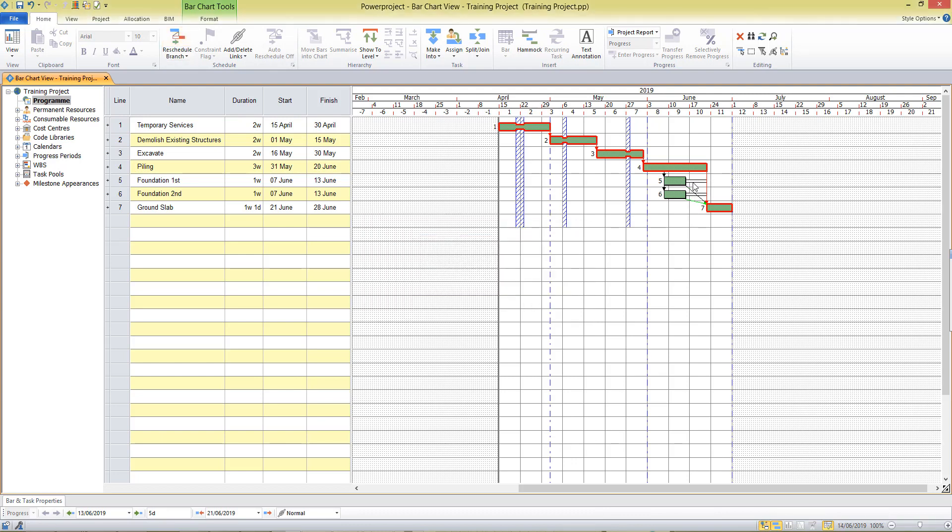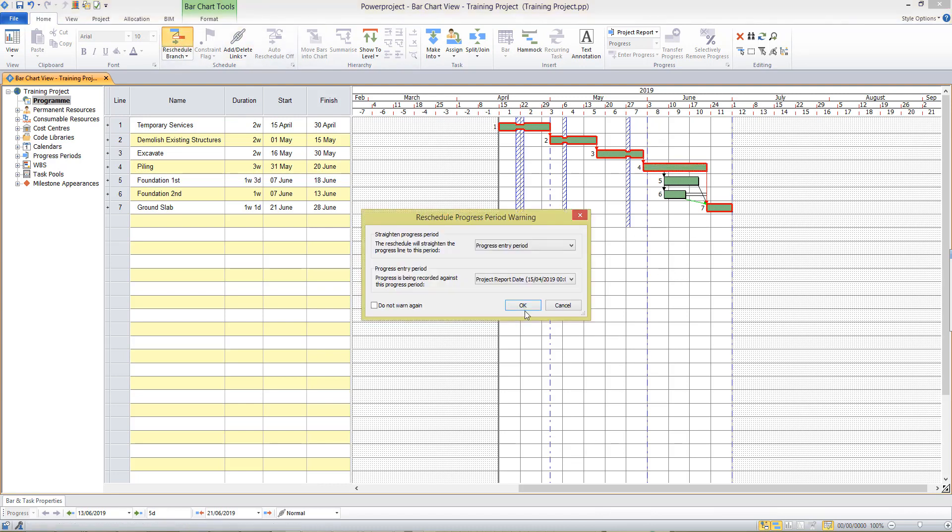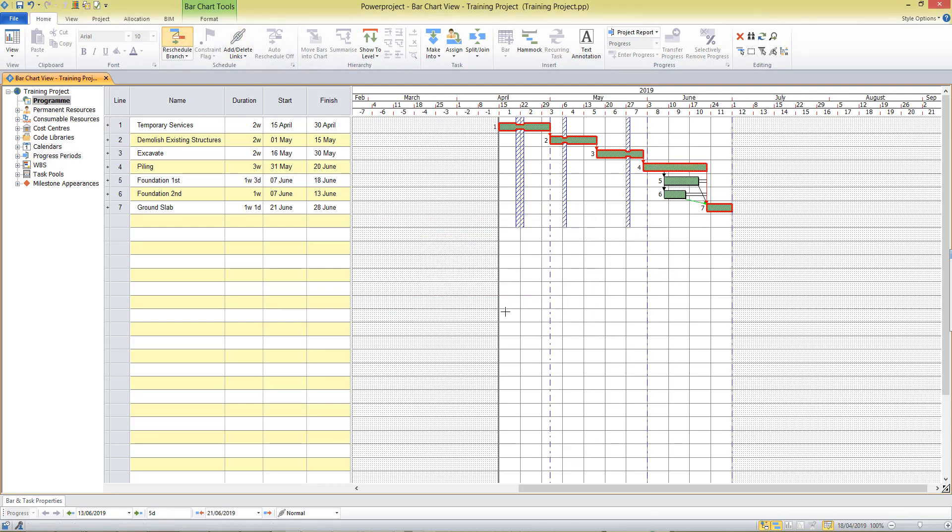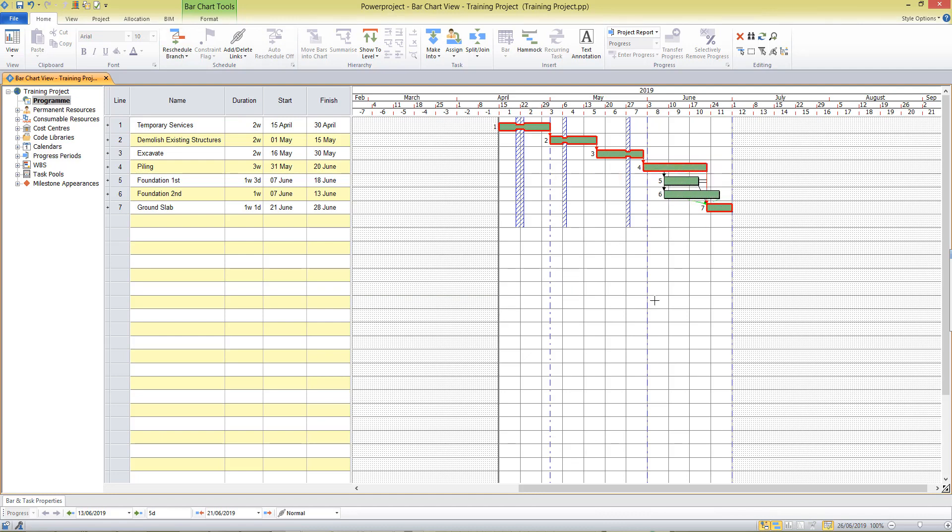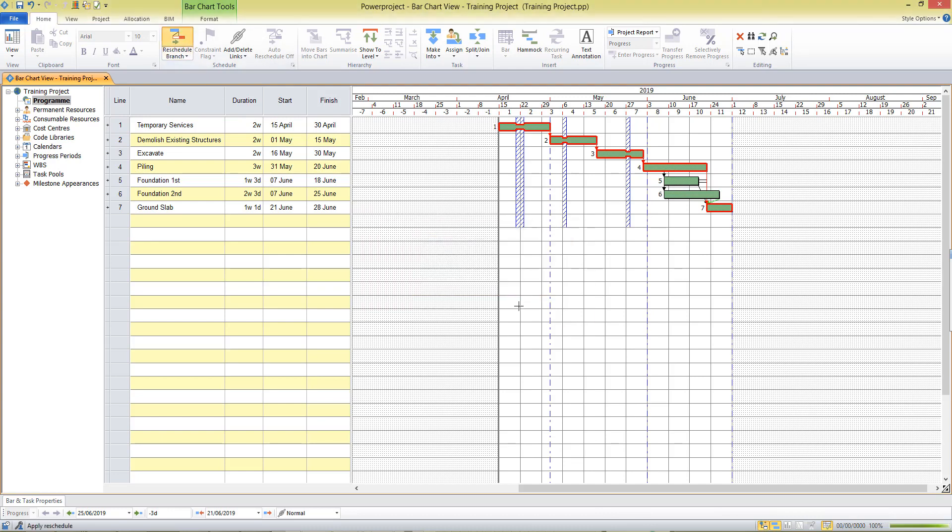So that's showing me if these tasks were to be delayed within the float period that would not affect my critical path or my end date. But if they were to be delayed past that date they would become critical and by definition affect the end date of the project.